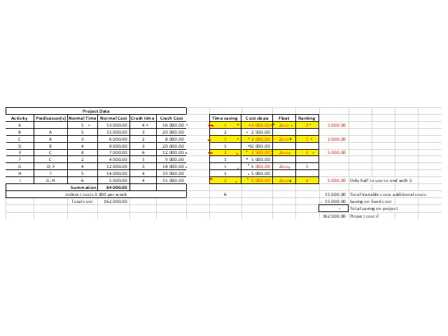Item 4 is ranked as item I because it has a cost of 5,000. And then for completeness, item G has a cost implication of 6,000 rand, and is thus ranked 5. So we want to reduce our project by 5 weeks.